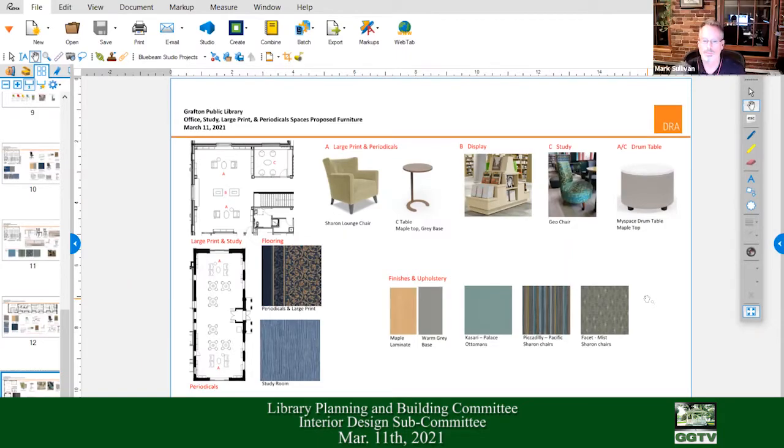Go ahead, Mark. Just in preparation of that meeting, the furniture is always a moving target, and we changed or potentially changed a few things tonight. I get that. The shelving, however, for the most part, has been finite. The quantities were in the grant. The design was based on that. So the linear footage, the size, and so forth has pretty much stayed the same. But we're over on the shelving budget, and so I want to have Corey put something together to speak to that on Monday, because I don't follow how we got off track specifically on the shelving. The only thing that I could think of, Mark, was steel prices have shot up. I know that's for a fact, and if that's the answer, then I get it. But I know in some areas we actually eliminate shelving and put those benches and so forth. And in general, the shelving hasn't changed all that much.